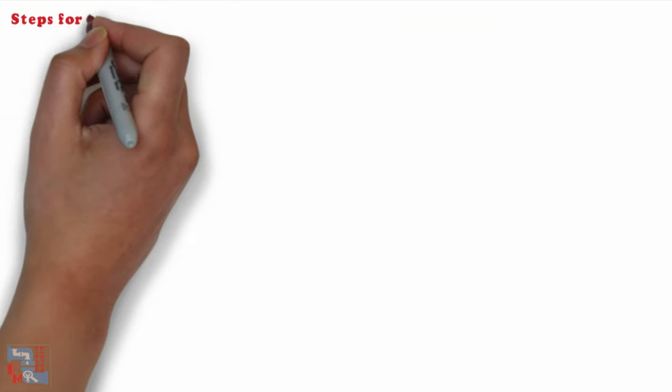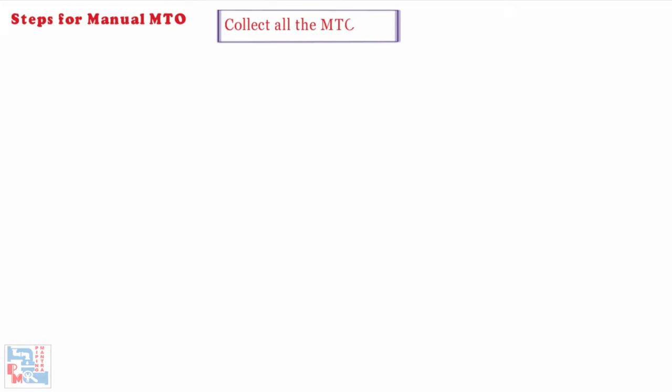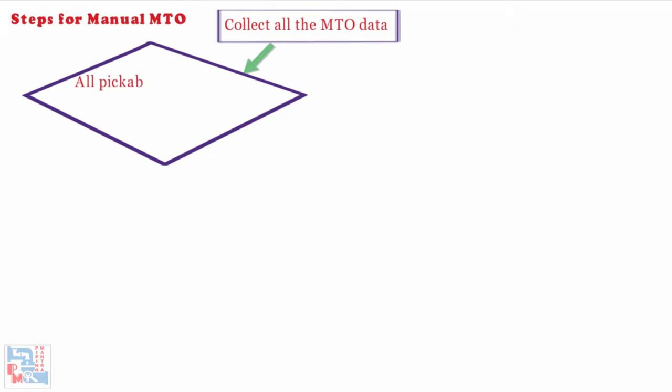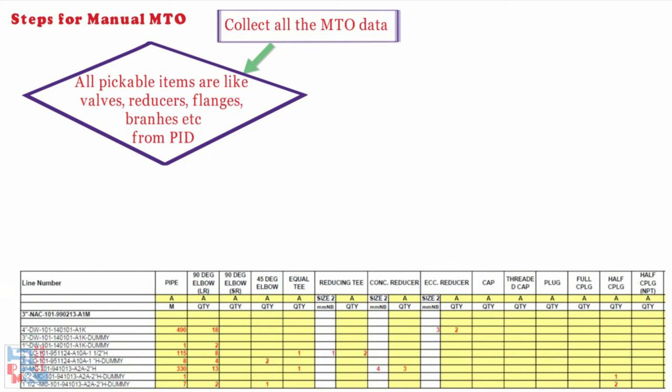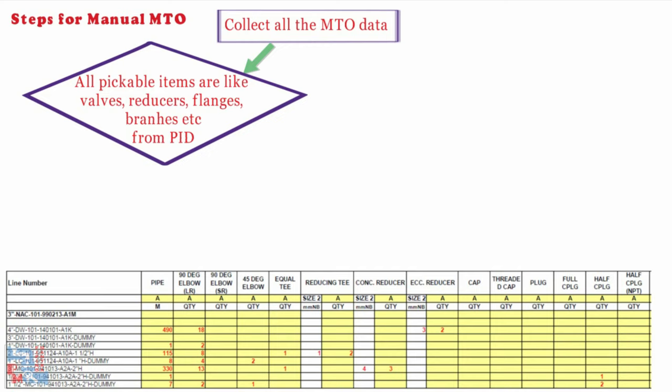For manual MTO preparation, first collect all the MTO data. Then all pickable items — such as valves, reducers, flanges, branches, etc. — are entered in the MTO format Excel file. All entries must be taken against a specific line number. In case a line number is not marked on the P&ID, it has to be assumed by adding a suffix A or B with the main header line. Specs should be mentioned as per the piping material specification.